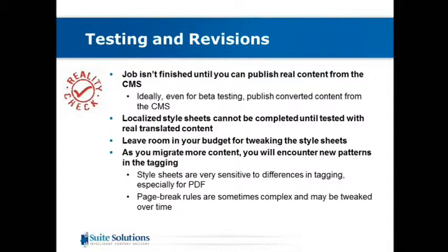Localized style sheets can't be completed until we actually have real translated content. The style sheet developer can go ahead and make all of the rules and say this is going to be localized in this way and X is going to be localized in a different way, but until you actually have real translated content, it's very difficult to do proper testing.